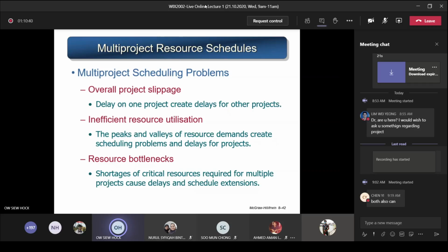Like your tutorial group 3, all the other teams already started the survey. The C-test one already started. I think the games one already started, right? And the one on COVID-19 also already started, because you don't depend on other projects. But the teams from TG3 are depending on my student's project, her system, for you to start and use for your HOTS assessment. So if there's a delay in her project, it will cause a delay in your HOTS assessment survey, and that will end up delaying your data collection and data analysis. Maybe other teams have already completed all their data collection and analysis, but you are still ongoing, so you will be behind time. Later you have a chapter to learn how to catch up if you are behind time. So that's the first problem.